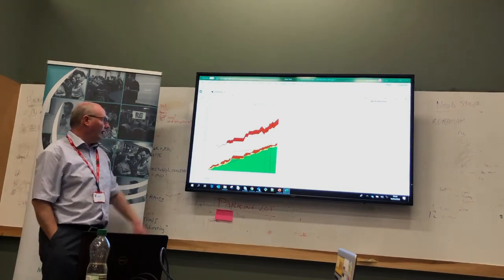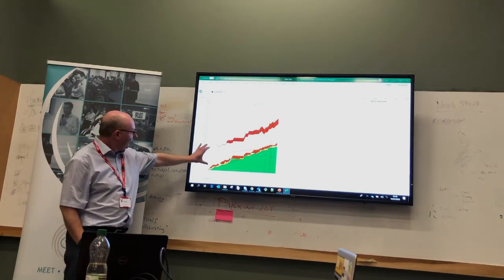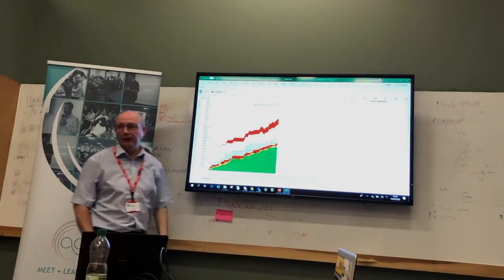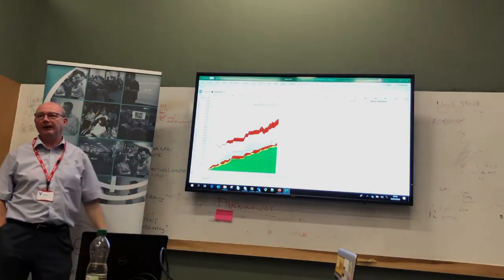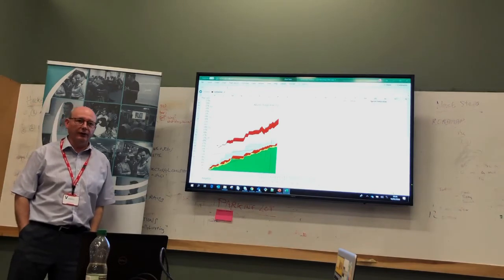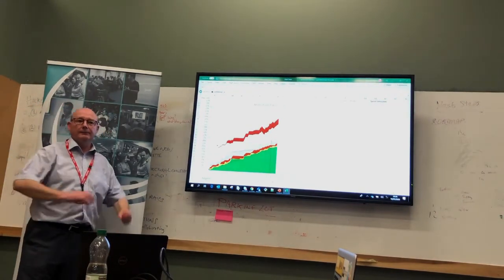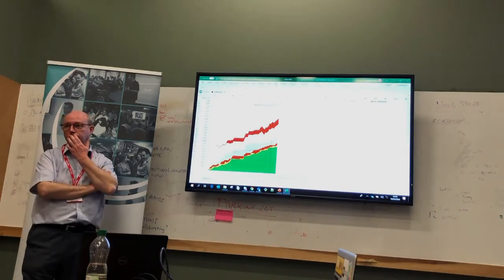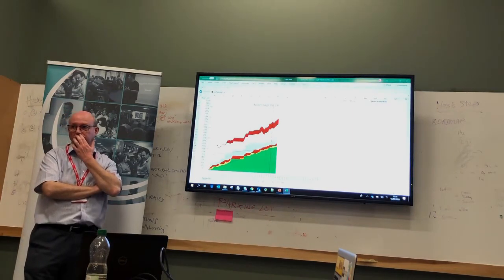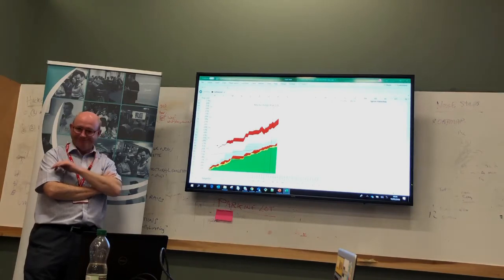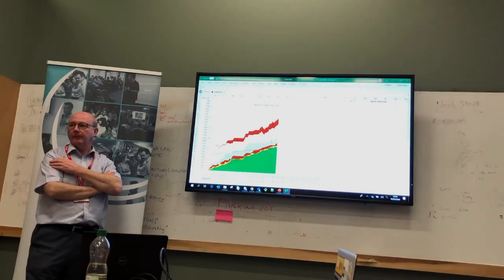We're halfway to no estimates on this backlog. This chunk and this chunk are not estimated, but they're on there. The average story size is 5, and it is consistently 5. That's the whole point of using CFDs, that you can go towards that. I'm not a fan of no estimation, by the way. I value estimation for the reason that it's about conversation, not about story points.